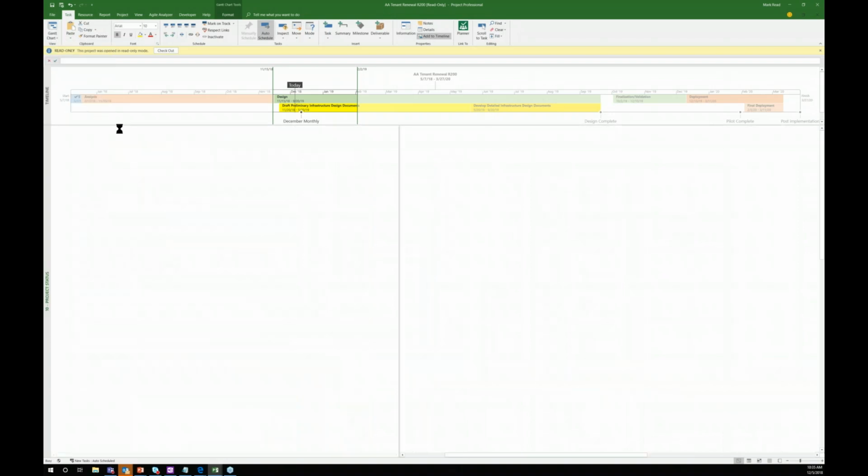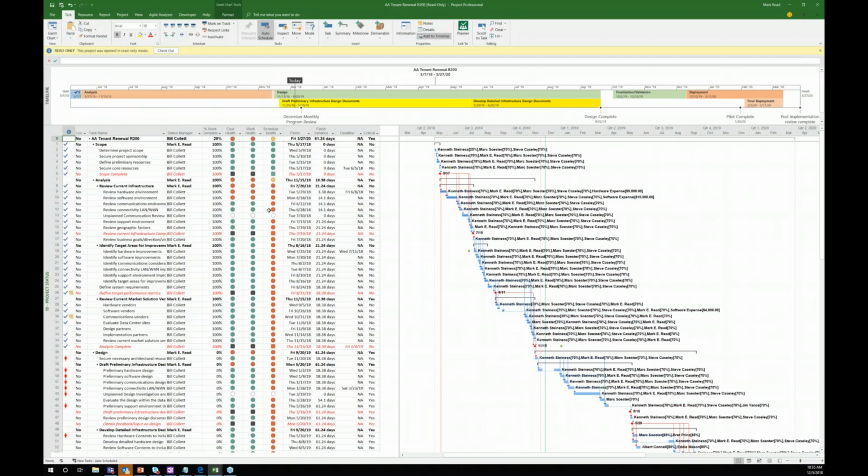And we've got this nice one called Project Status, which pulls out our KPIs. Now, we've programmed these KPIs into the system to interrogate your baseline and allow you to see if you're slipping in one of three different dimensions: whether it's cost, so if your cost is exceeding your baseline cost, or your work, so whether your effort hours are exceeding your baseline, or your finish date. And each one of them is set to express itself in percentage terms, which is great.